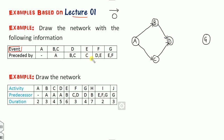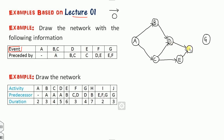C starts E, so it goes to E. D and E both combine, then it goes to F. E and F both combine to form G. When combining nodes, if a dummy arrow is needed, it is represented by a dotted line. This is the way to draw the network. For more detail, listen to the previous lecture carefully.